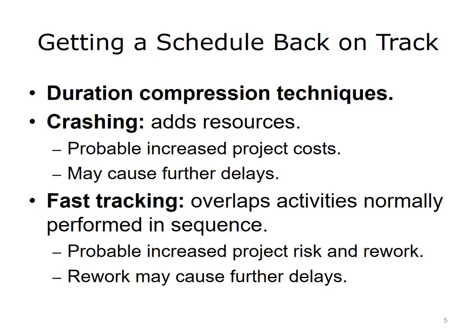Sometimes, despite all your planning, schedules get behind. Two approaches to compressing your project schedule include crashing and fast tracking. Crashing adds resources to help complete an activity on time. Crashing the schedule will probably result in increased project costs. If you are adding team members, it may even create further delays, because current members will have to spend their time bringing the newcomers up to speed.